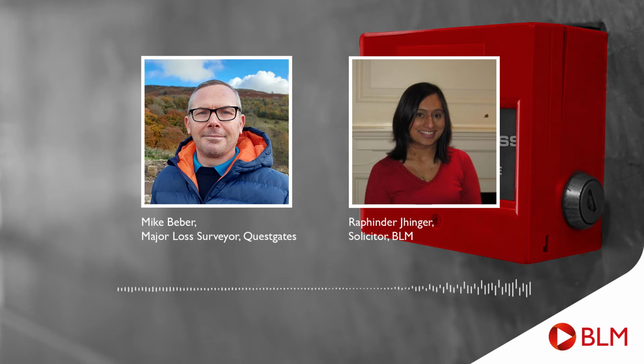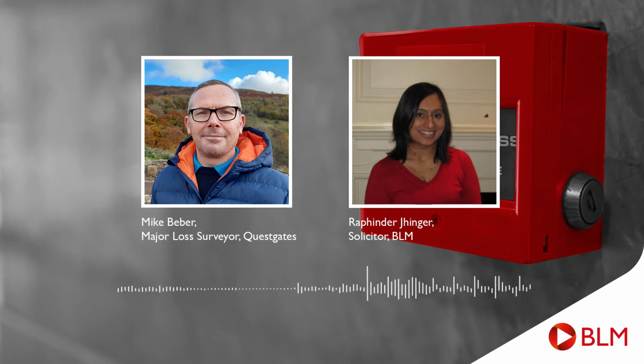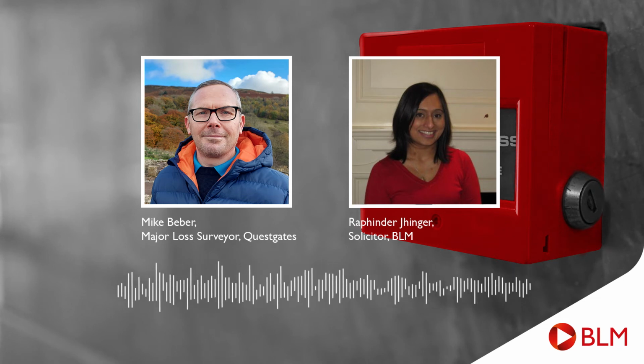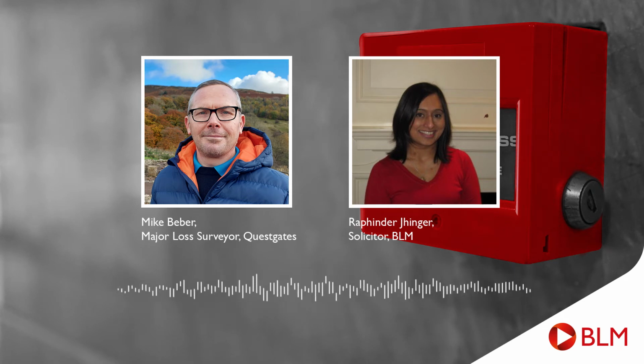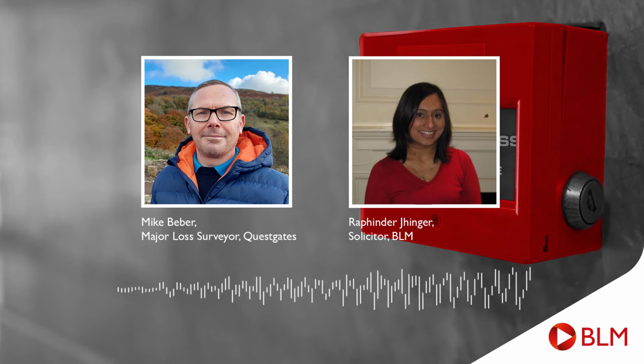Looking at when you need to remove upper undamaged parts to access lower damaged sections, is there a risk of damage being caused to other undamaged parts of the building during removal? So the short answer to this is yes. It is common where opening up works are required to the structural elements of the module. Some damage will occur to the framing or the structural element of the module, which has to be reinstated after the investigations are completed. And this can be complicated and require assistance from a structural engineer or a module design specialist.